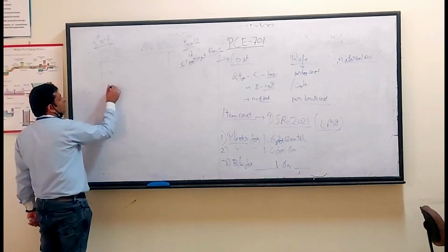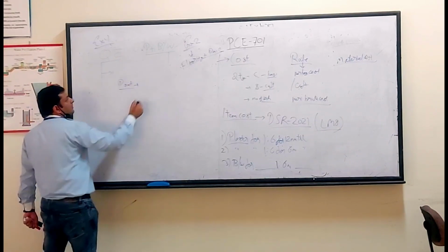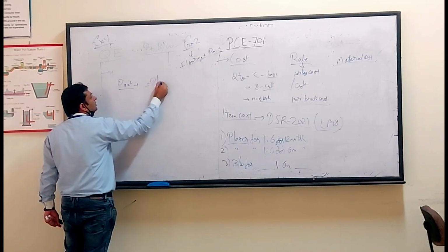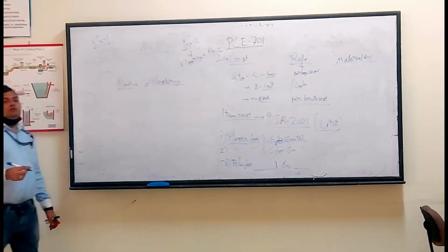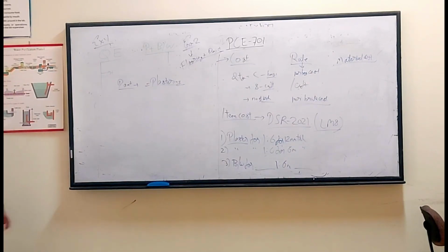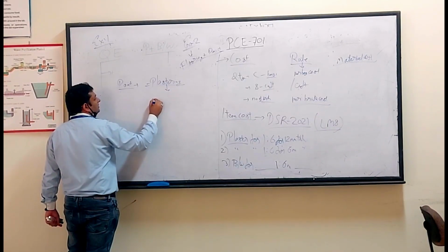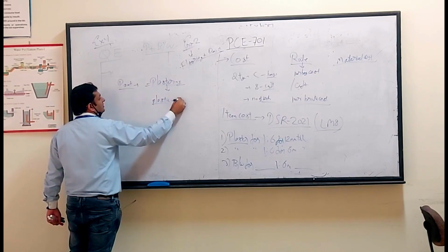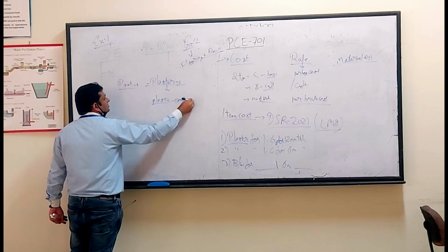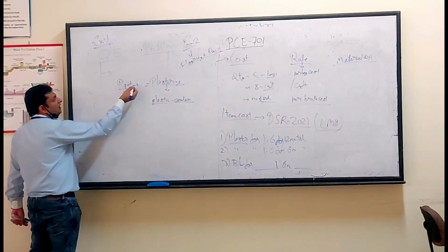Now the second experiment, you can see for paint, the same lab, the area will be equal to what? Plastering area. So you won't require paint measurements again. Wherever you do the plastering, the same way with the paint, you take the category of the paint, which will be plastic emulsion paint, because there will be different paints in the DSR for the cost. The area will be the same calculation you have to do. Paint is very easy for the area.